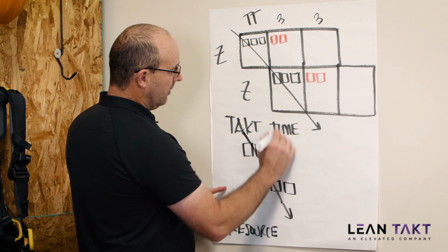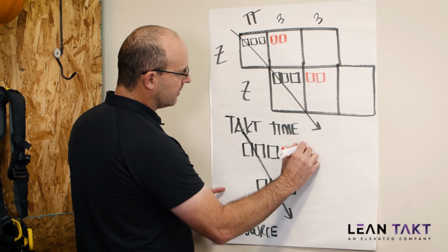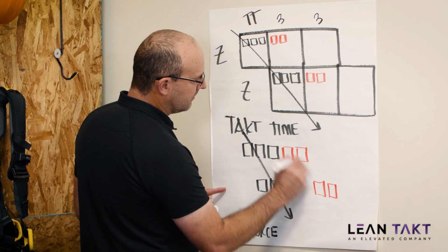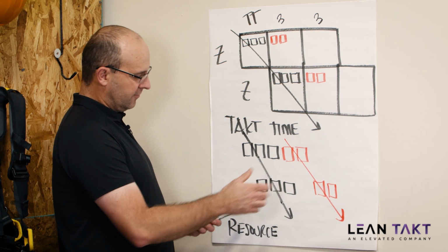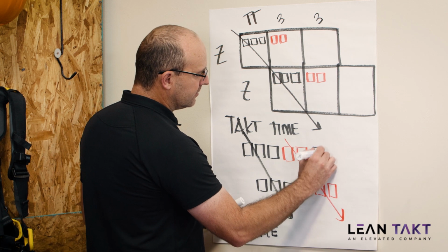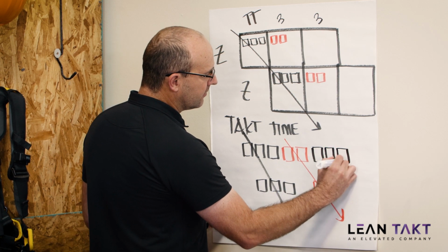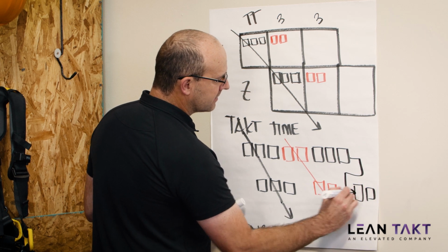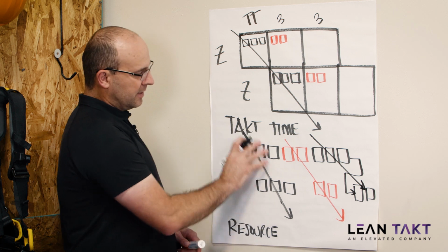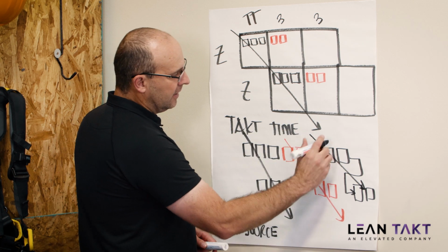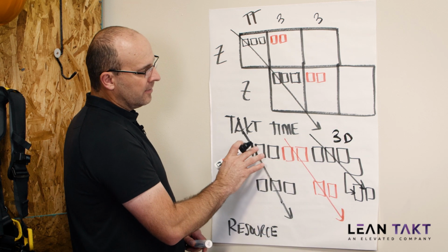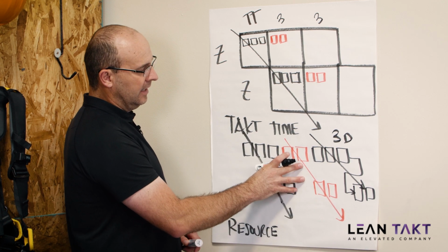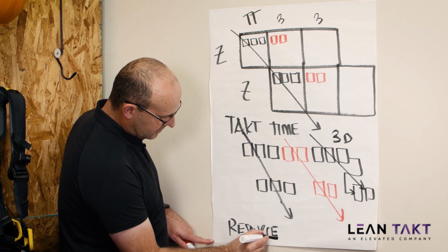You could also say once the fire sprinkler contractor starts, that they could stay on a 2-day takt time and have their own beautiful flow. Then when you get into the wagons that needed 3 days, then it can go onto your 3-day takt time. So really, especially because this is at the front, before you hit your 3-day, you can just go ahead and run these at their own pace. This is called a multi-train takt plan, and it's resource-based.